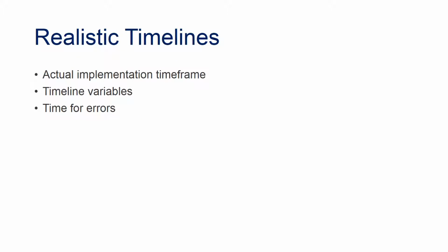One area in these types of projects that is commonly overlooked is not just building a timeline into the implementation, but building a realistic one. Think about how long it will take to actually develop this emerging technology. Does anything need to be physically built? Is there any programming required? Will an outside organization or consultant be needed to help with the implementation? What are the delivery times? These are just a few of the questions you should consider.